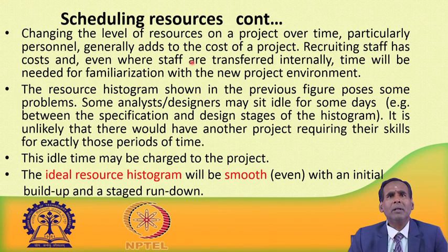So, changing the level of resources on a project over time, particularly changing the personnel or the manpower, generally adds to the cost of the project. Why? Because recruiting staff has some cost. Even when staff are transferred internally, some time will be required for familiarization with the new project environment. So, this may also add some cost.